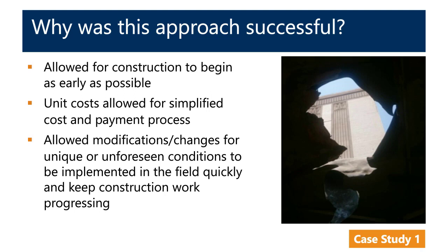It helps simplify the payment process. The unit costs fit a lot of different situations, again, based upon a quantity of stone. So one unit cost based upon a cubic foot worked for a variety of conditions on the building and made payment application easier to understand and push through.